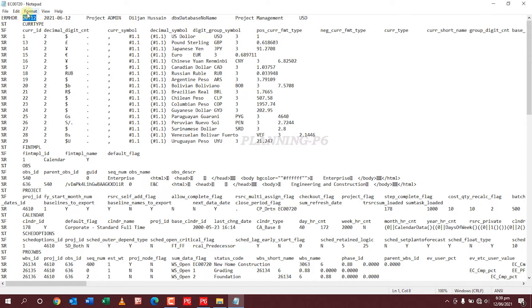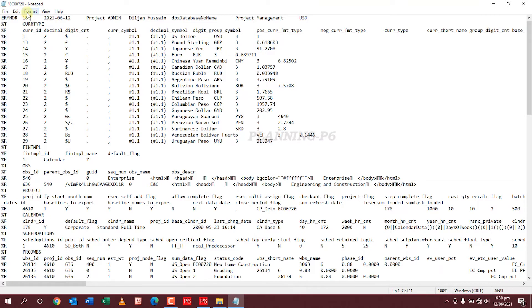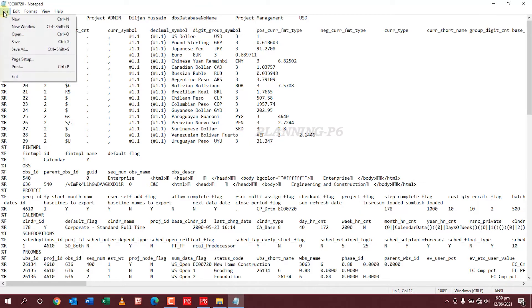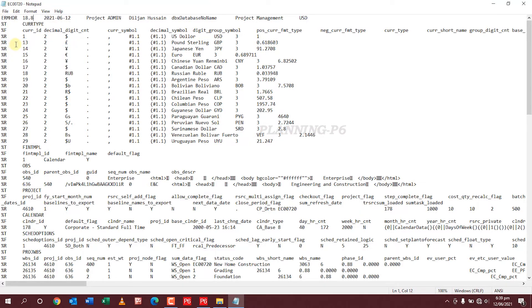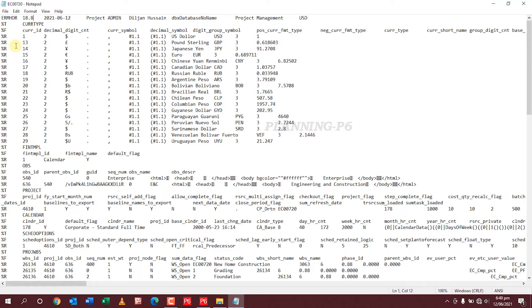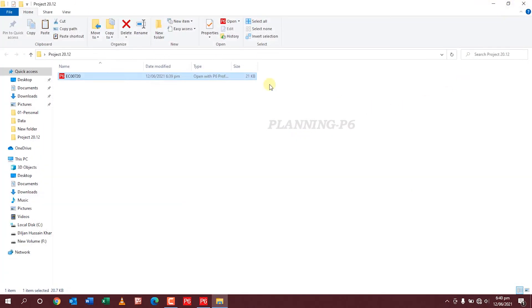Now you can change the version from here to 18.8 simply, and then save the file as it is. This is the way how you can change the version of the file. Close it and let me check again just to show you.